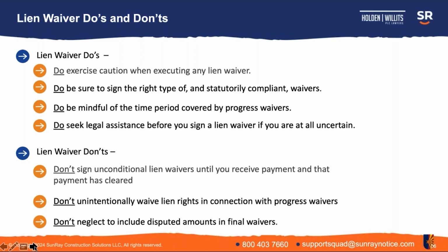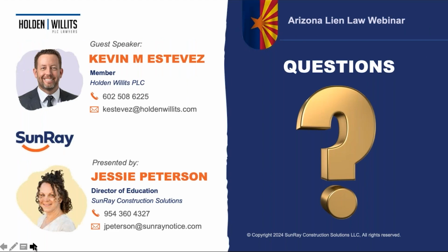And then the final: don't neglect to include disputed amounts in final waivers. If there is a dispute over certain amounts and you get to the end of the project, that blank space in the final waivers, whether it be conditional or unconditional, is there for a reason, and make sure that you are taking advantage of that space to protect your rights as best you can.